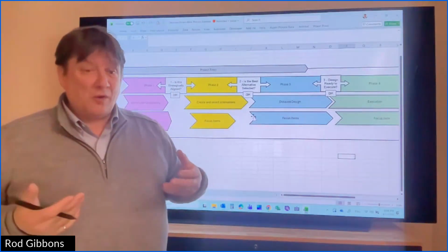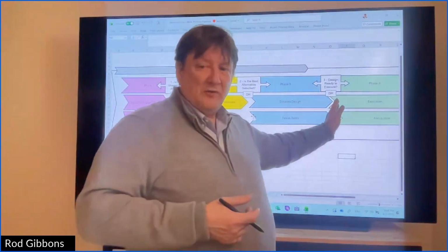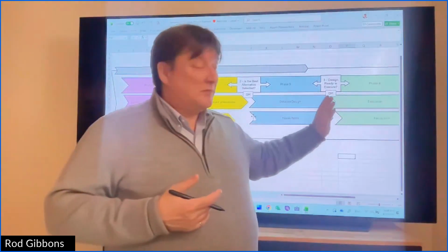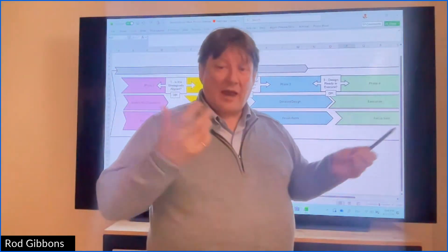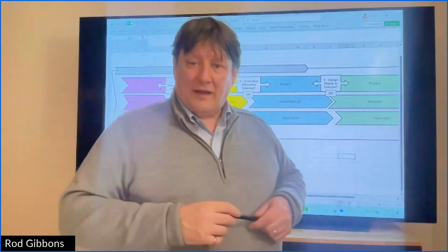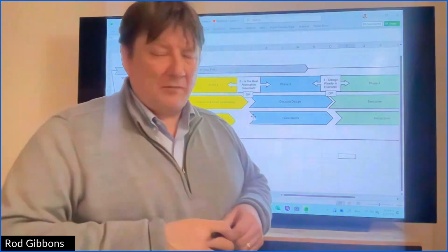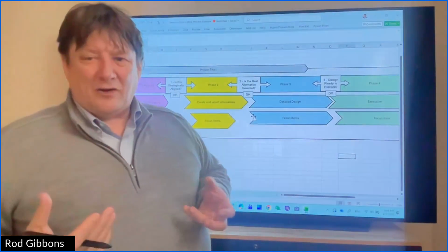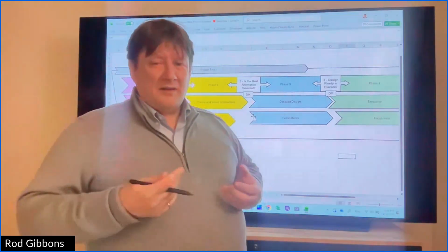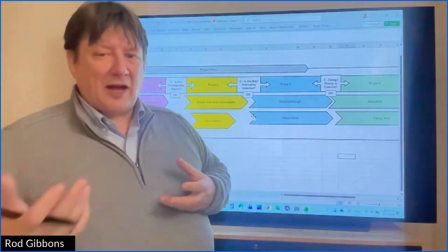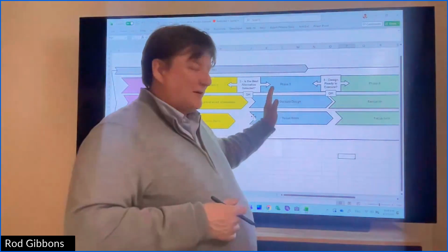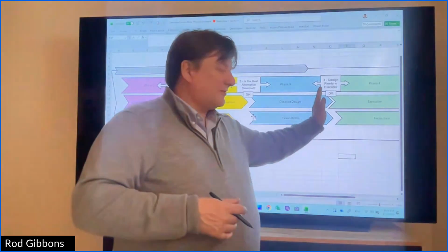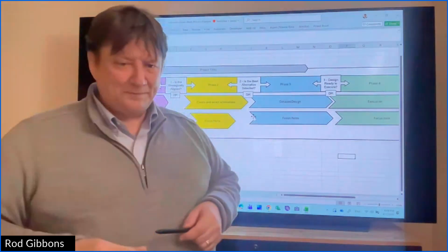However, project teams know, even though that order is placed, if this doesn't get approved, that's a cost that's put in, that's at risk, because the project doesn't go ahead until it actually gets approval. Then the stuff could be restocked or used on another project, something like that. But that is a bit of a shortfall in this, is that a lot of times, because of the nature of equipment ordering in the oil industry, especially through more traditional sources, the lead times are excessive. So there is sometimes a long lead order required. Ideally, you get these decisions as close to this execution decision as possible.